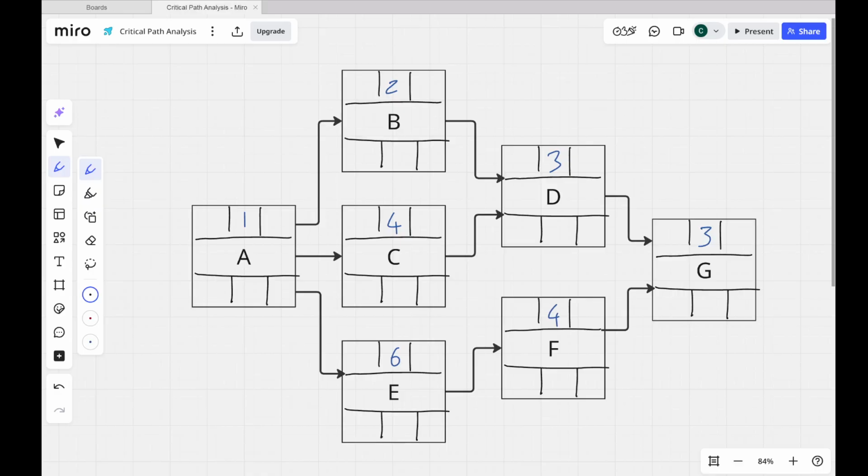This is purely mathematical. So in maths, the earliest we can start counting from, technically, is 0. So the earliest start for task A is going to be 0. Now there are views of it starting on different days. For example, I know a lot of people in the US will use day 1 as the starting date. But for this, we'll keep it nice and simple. We'll say day 0, i.e. we're starting at the earliest possible point, 0 of the first day. So we put 0 in there, day 0.